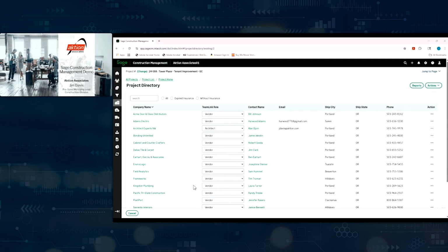I can actually go in here and create an RFI. When I do this, I want to show you, it's coming to me, the owner of the product, not to the architect, not to an owner of the job or anything like that. He's able to create a change request, but it's got to go through me first. So I might just respond to him, or I might clean it up and forward it on to an architect. Anyway, it's then linked to where if it's responded to, he will get the response immediately also. So it really cleans it up and gives us a more direct line to the system.